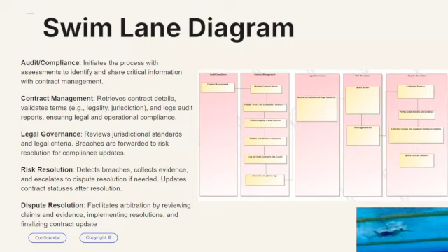Under arbitration, the process goes like this. Both parties supply their justification, documents, contracts, claims, everything in the process. And then an arbitrator reviews and suggests binding solutions. For example, the supplier might say the delay was due to an unforeseen circumstance. But the arbitrator will assess that and then decide whether the supplier should waive maybe a portion of the penalty that is charged, or change the contract terms, or terminate the contract.